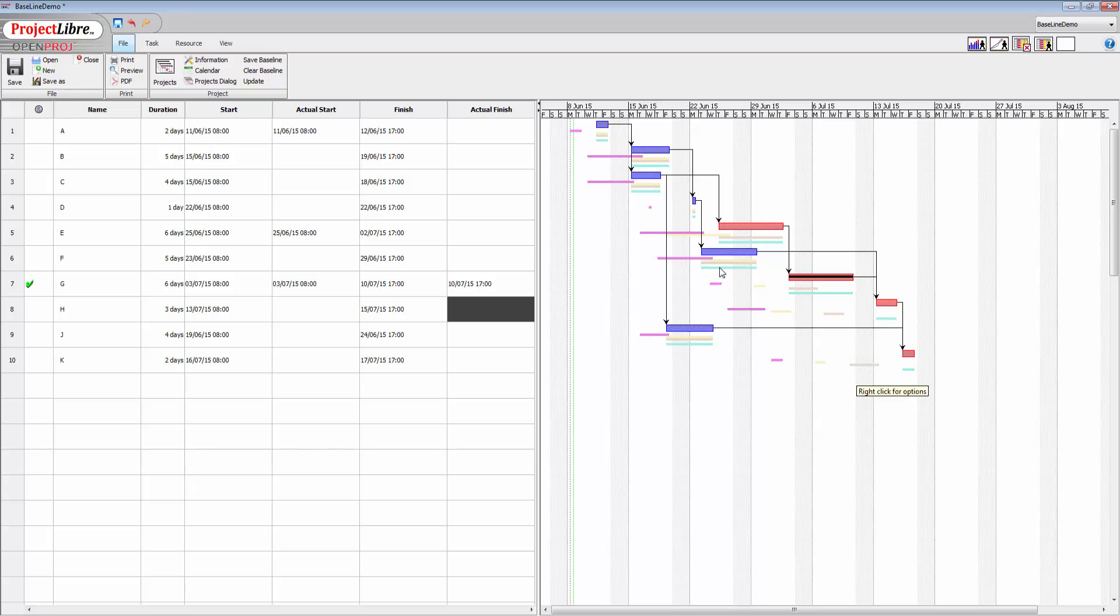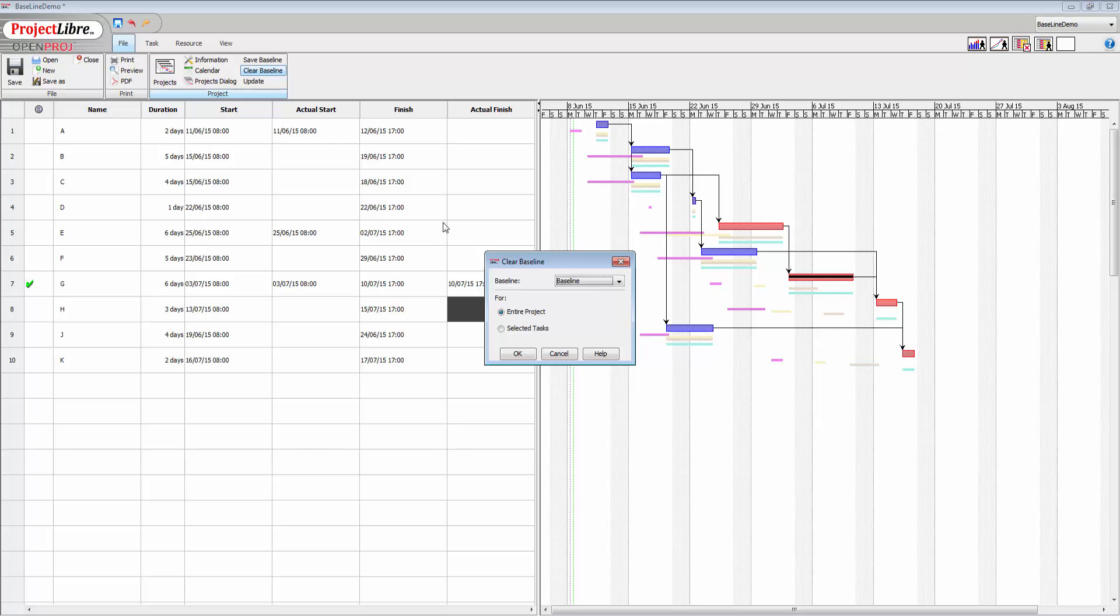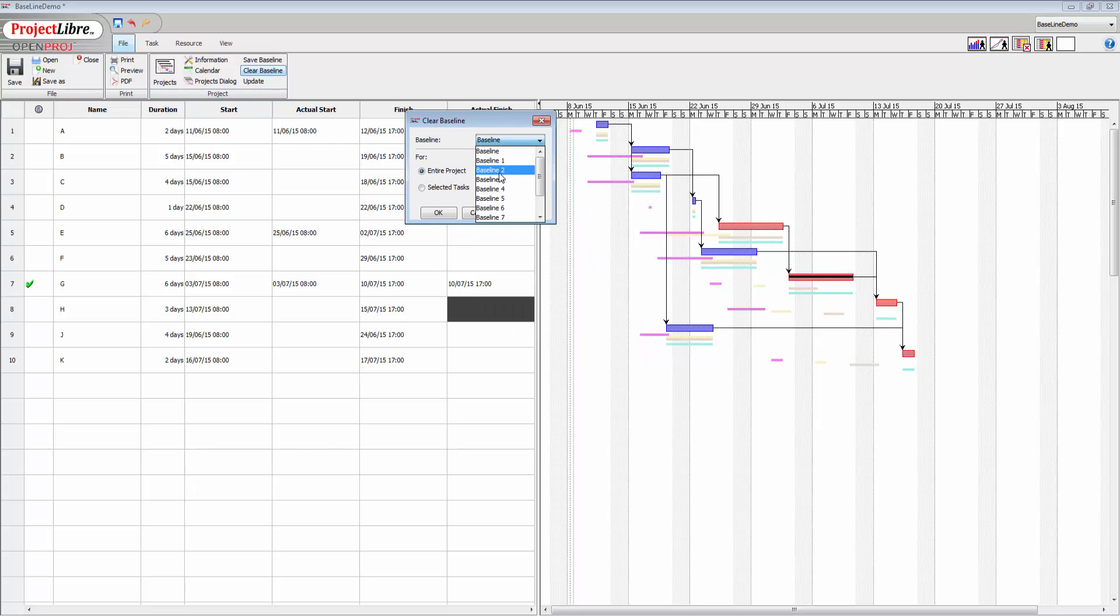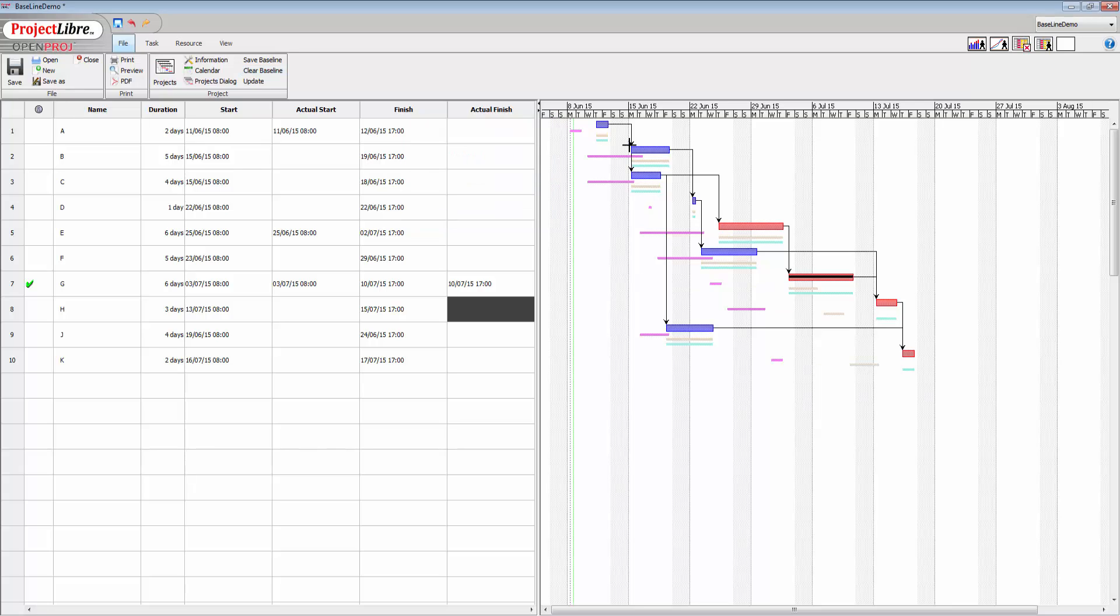Now you can also clear those baselines if you want. So for instance, if I were to want to get rid of baseline 2, I can do that by going into clear baseline and selecting baseline 2 for the entire project, click OK, and now it's gone.